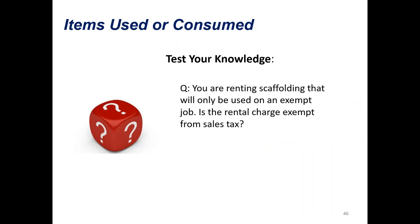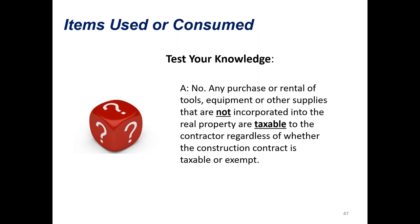Test your knowledge question: You are renting scaffolding that will only be used on an exempt job. Is the rental charge exempt from sales tax? So you're renting the scaffolding on an exempt job—it's not going to be incorporated into the final product, so I'm going to say it is not exempt. Correct. Any purchase or rental of tools, equipment, or other supplies that are not incorporated into the real property are taxable to the contractor, regardless of whether the construction contract is taxable or exempt. The code word is consume.